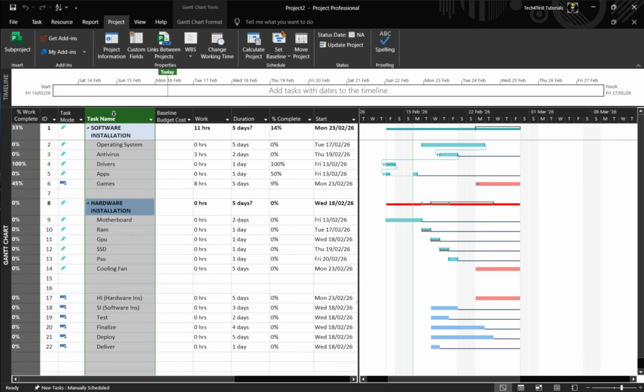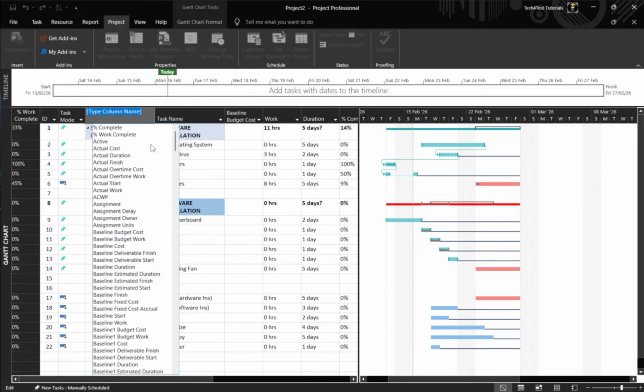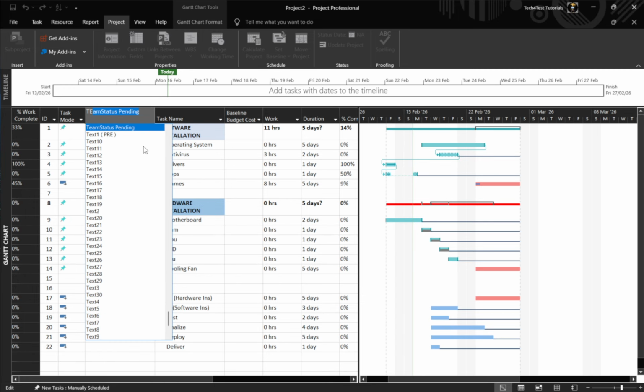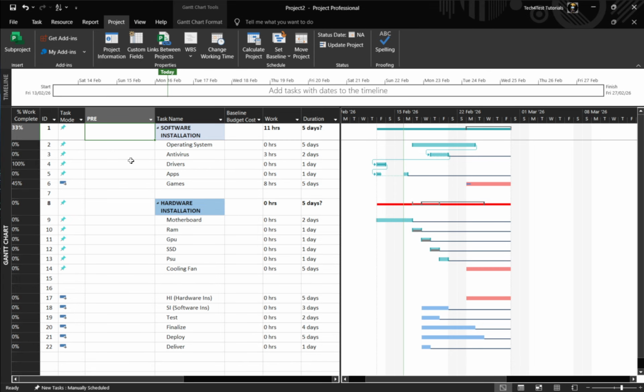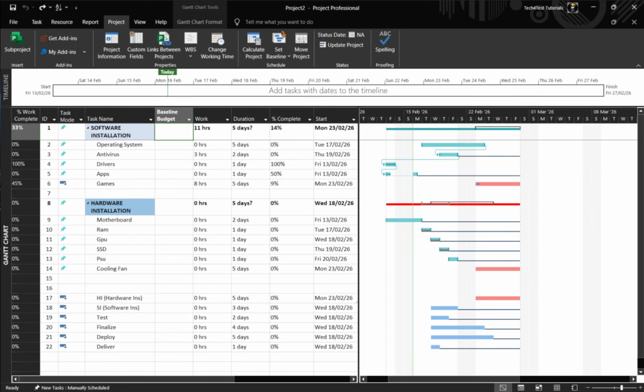A few clarifications will help you interpret what you're seeing. The start and finish fields already show actual calendar dates. What they don't show is a duration measured in calendar days. The custom formula fills that gap without changing your schedule or resource calendars. It simply calculates and displays the count. Also, adjusting the timescale on the Gantt chart affects only how the chart is drawn. It won't create a new column or change your data.